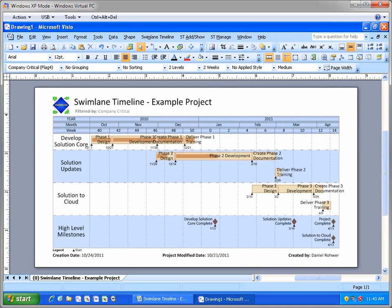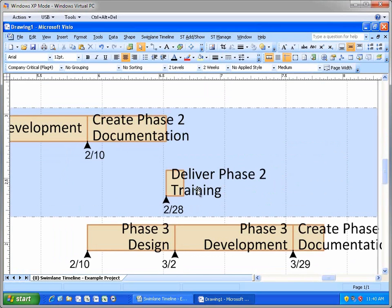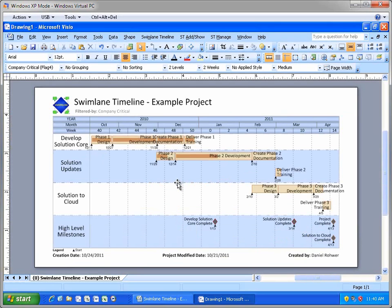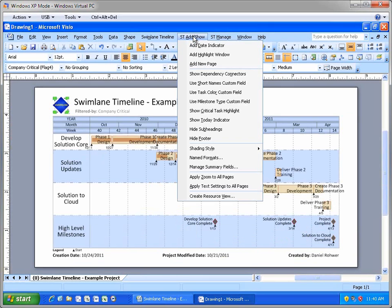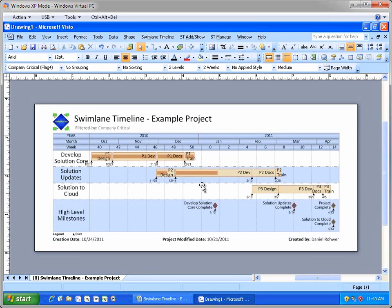The Swimlane Timeline uses layout algorithms that avoid task and text collisions. Using the default task long names for tasks may force the Swimlane Timeline layout to be more spread out than necessary. Users may be able to further compress their Swimlane Timelines by applying the task nicknames. Let's take a look at that. Remember the Visibility Short Name field in the project schedule? Let's apply those nicknames to all tasks by selecting the Use Short Name Custom field in the Add Show menu. Notice that the layout has now tightened up since many of the long name text collisions no longer occur.